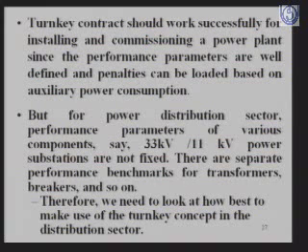What we have done is, turnkey contracts have so far been used in the case of setting up power plants, because here we can specifically design what we want. We want a power plant of 500 megawatt capacity, or 250 megawatt, or 100 megawatt capacity. So I can define that, and this is what I tell the contractor, and the contractor supplies everything. He arranges the machinery, he does the detailed drawing and engineering, and he implements it, and at the end of the day he gives me the key, I go and operate the power plant. That's called the turnkey contract.